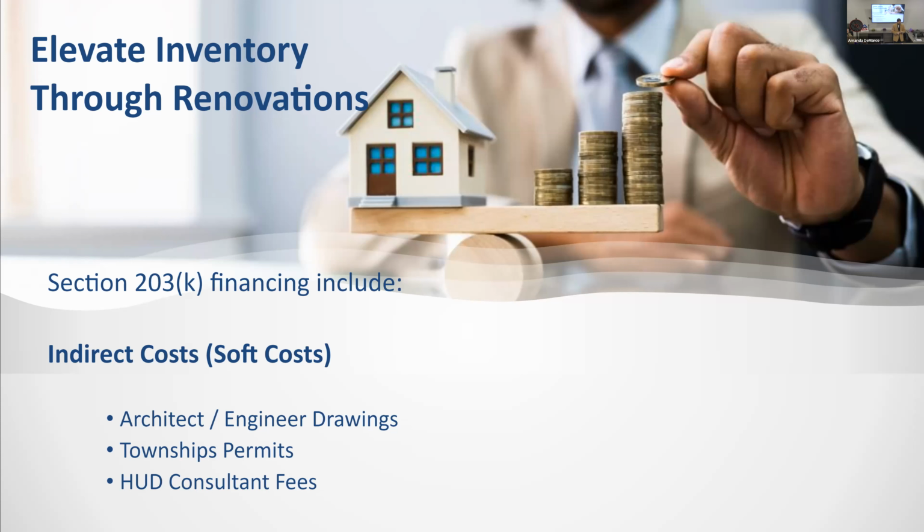a partial foundation, so let's say they want to expand their house, they want to put a brand new foundation. You don't know what's on the ground. So sometimes they want a little bit more than the 10, they want the 15. Or I've been involved with some of our own agents, and people have bought foreclosed homes. So nothing was up. They want more money, such as the 15 and even 20% if the home doesn't have working electric or water. The mechanical equipment, such as the furnace or the hot water heater, may not be there.